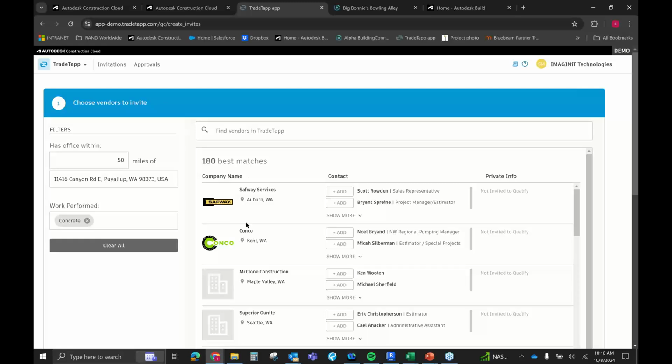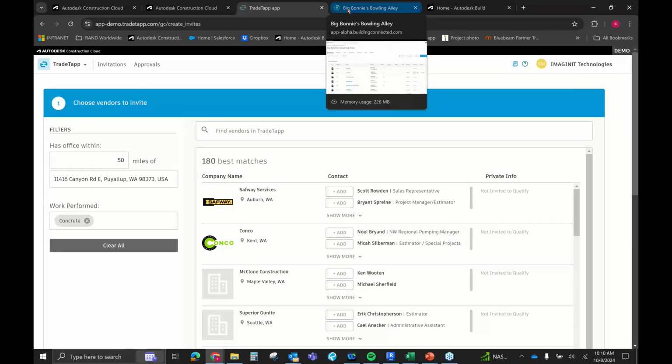At this point in time, I'm able to actually go ahead, select my contractors, and I can add them to this project that I'm working on. I get their contact information, and I'm able to say, hey, we have this coming up. We would love for you guys to put in a bid and see what you guys can come up with. You know, we've heard great things, all that stuff. So once I've gone ahead and I've actually invited these contractors to bid on these projects, the next step is actually receiving those bids and looking at what they can do for us. So now I'm going to, once again, switch windows here, and we're going to move our way into Building Connected, right? Working our way through the ACC.